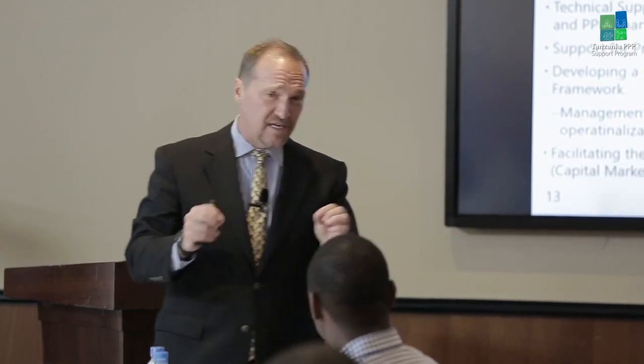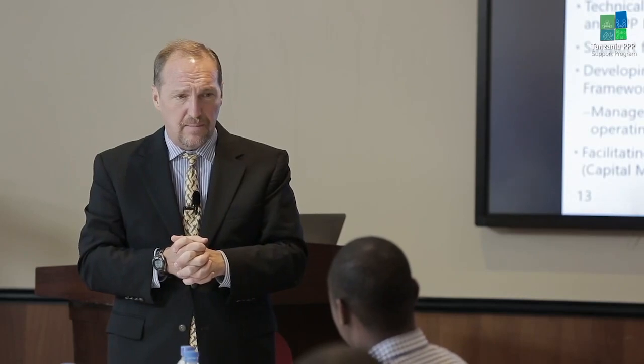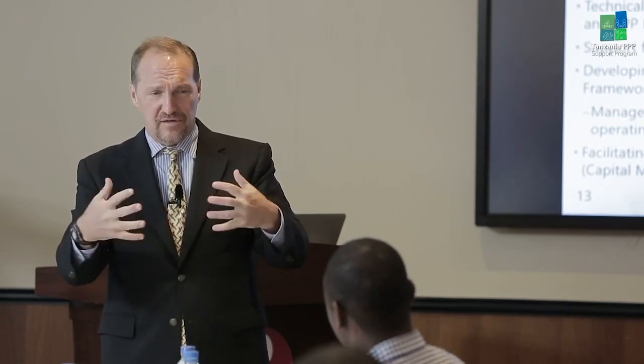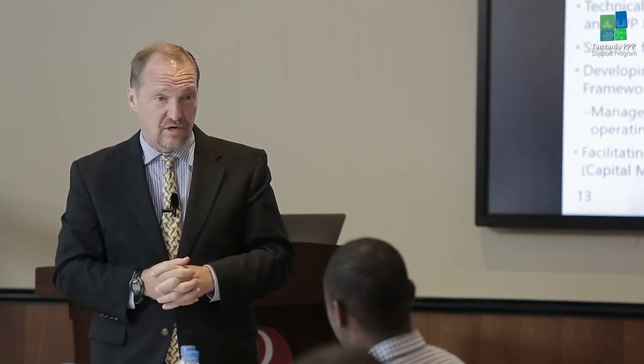But you will find in practice, we'll talk about this more tomorrow, you have to identify all risks in a project. That's one process. You need to analyze their impact. Do they affect the project greatly or moderately or maybe not at all? You have to look at the probability. These are some subjective measures. How likely is it that a risk event will occur?